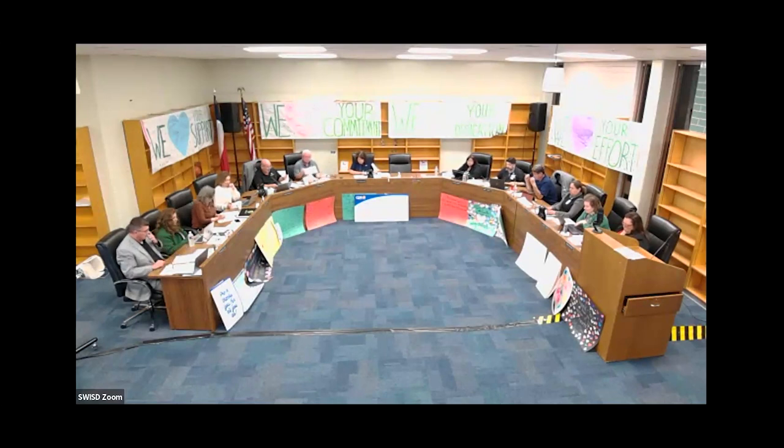Consider approval of the GMP 2 for the Southwest Elementary renovation project. Similar to Elm Creek, we had met with Bartley Koch and Garza Baumberger, our architect, to review the subcontractor's bid for GMP 2. We're here to recommend to the board to approve the GMP package 2 of Southwest Elementary, not to exceed $19,805,729, and allow district staff to negotiate terms and conditions.